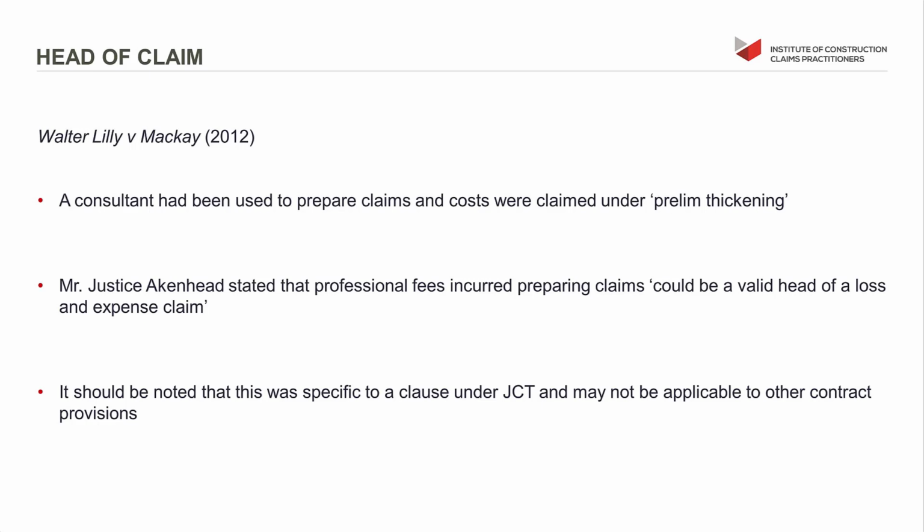And if arbitration is invoked, we do have a situation as established under James Longley versus the Southwest Regional Health Authority, that an arbitrator, when awarding costs in the arbitration, they award costs for claims that were compiled, even if those claims were compiled prior to the commencement of arbitration.